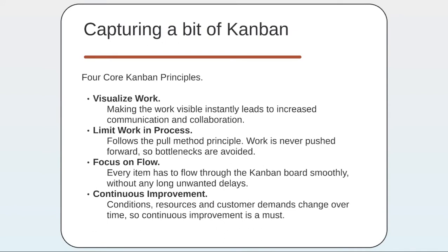It is really helpful to avoid bottlenecks, because if we have 3 developers, we can set the maximum work in progress limit for development as 3, so that there will never be a developer working simultaneously on more than one PBI. Also, it follows the pull principle.